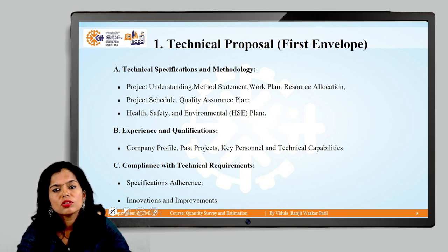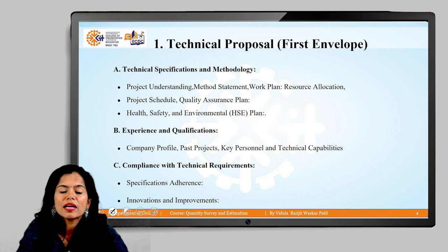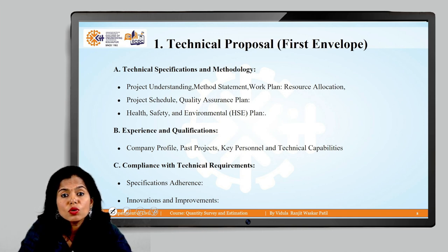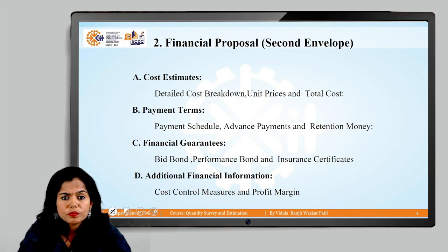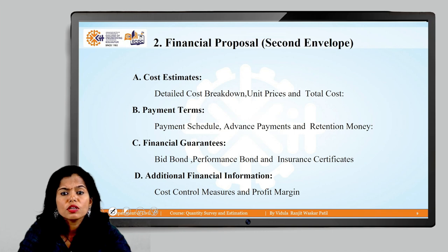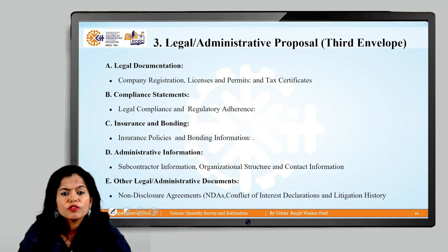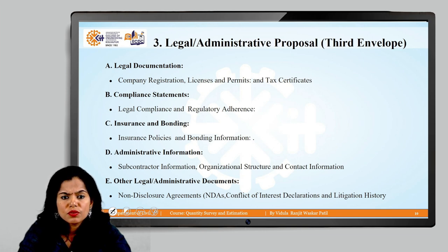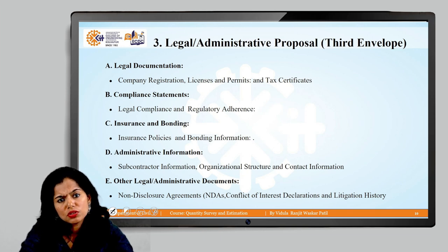In the two or three-stage tendering system, the first envelope is matched against qualification requirements before the second envelope is opened. The second envelope contains cost estimates, payment terms, financial guarantees such as bid bond, performance bond, insurance certificates, and profit margins. The third envelope contains legal documents, tax certificates, insurance, bonding, and administrative information that cannot be disclosed initially.